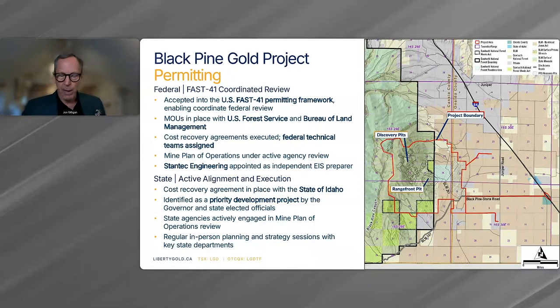We're also working very closely with the state of Idaho for the key permits that we need through the state. Those are principally the cyanidation permit and the air quality permit. So we have a very well experienced in-house permitting team managing the interface to multiple agencies to take us through the process.